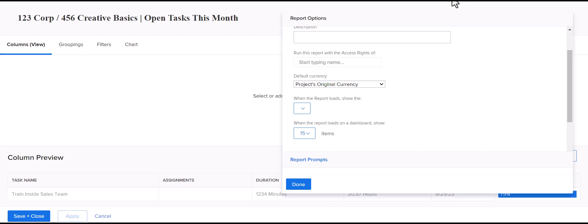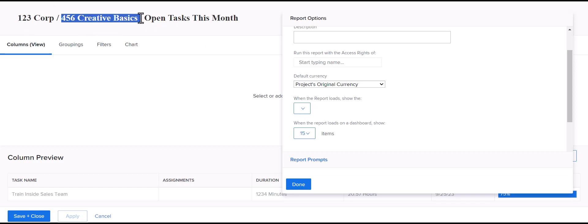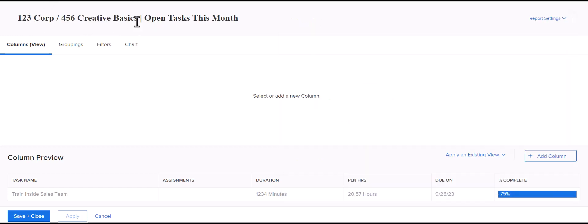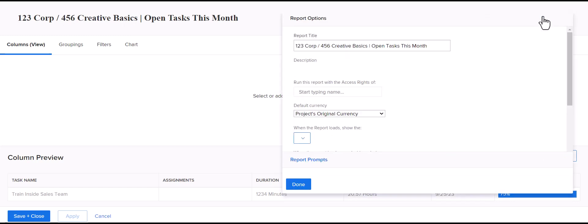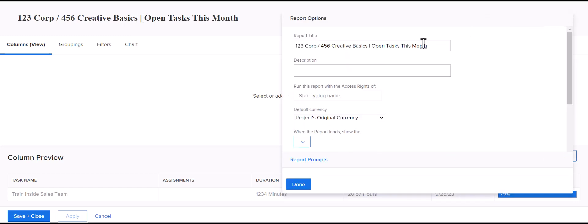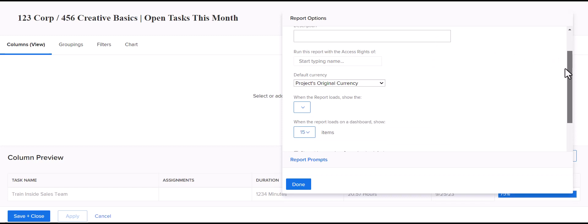So, let's say you have a team member who they only work on 123 Corp and not 456. If they're running it on their end, they're not going to see anything for 456 Creative Basics if they don't have access to that project. So, that's just a little tip and trick there that you can set up a report to run with the access rights of a specific user so that people can see everything that they may need to see.